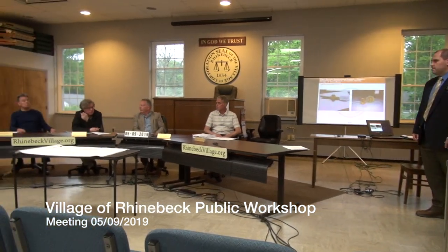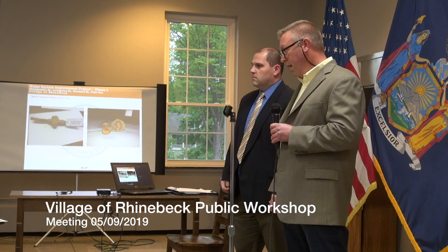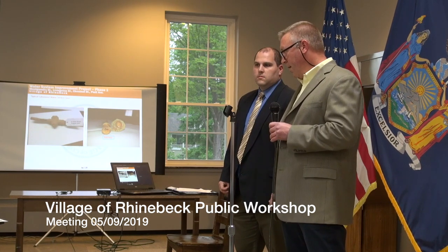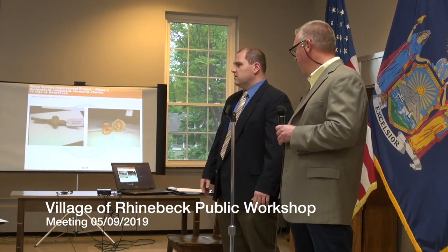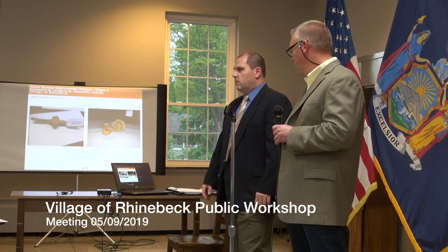Just to follow up on Pepper's comments, contractor parking. Do you have a staging area for the work crews? We're actually coordinating with John Fenton on that. I think there were two potential private property owners that we'll be looking at for a staging area for contractors and construction materials. So we're hoping to flesh that out before bids are in. Within the next week or two, we'll probably make a final decision. And if nothing is pre-arranged by the village, it'll be the contractor's responsibility to find a suitable location and enter into a private arrangement with that landowner.